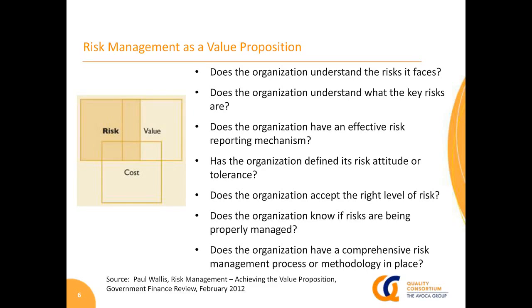Now, this is something that is also dependent on the stage, the timing of a program, or other risk-based perspectives. As an example, and I'll touch on this a little bit more later, if you are currently conducting a phase 3 pivotal registration trial that is critical path for the submission of a molecule and a registration package, then that is a situation where you probably have low risk tolerance, or an attitude where you do not want to accept the risk.